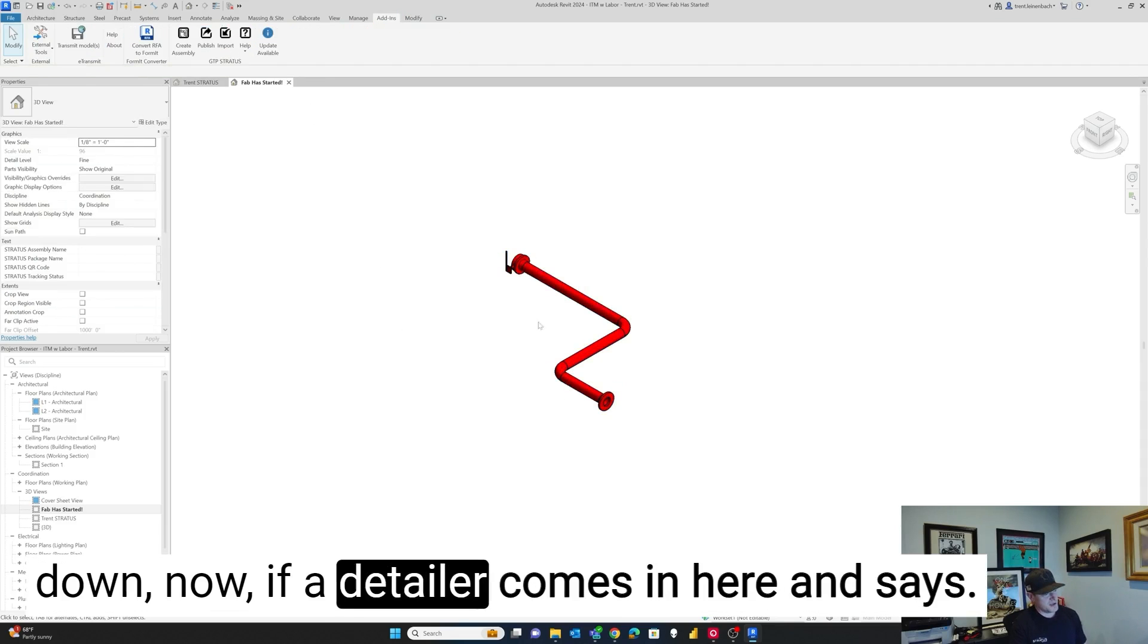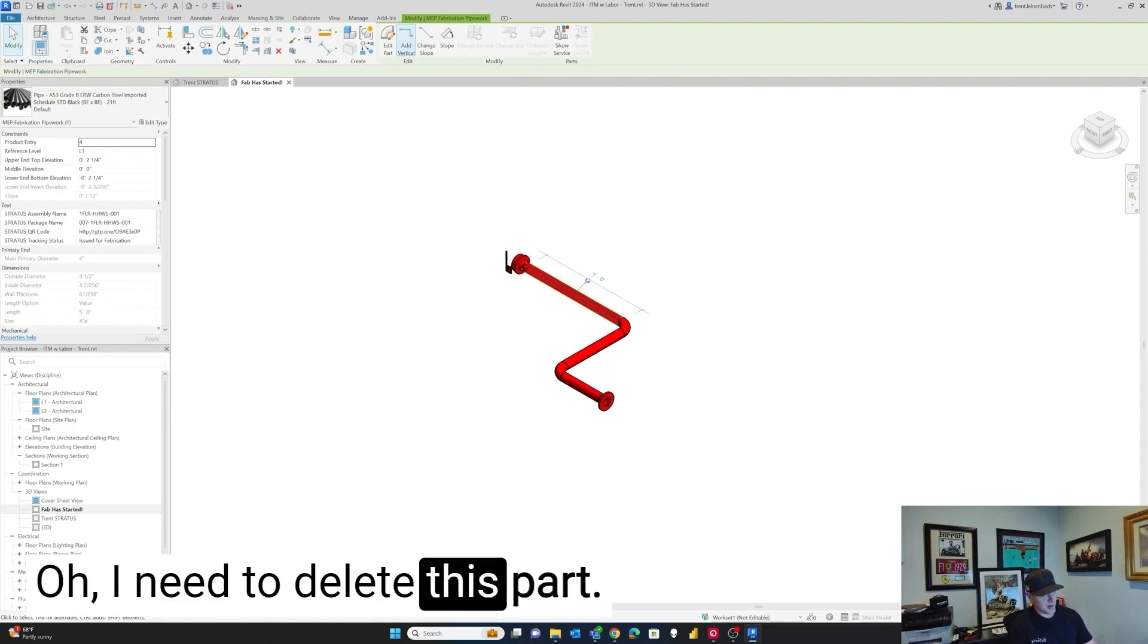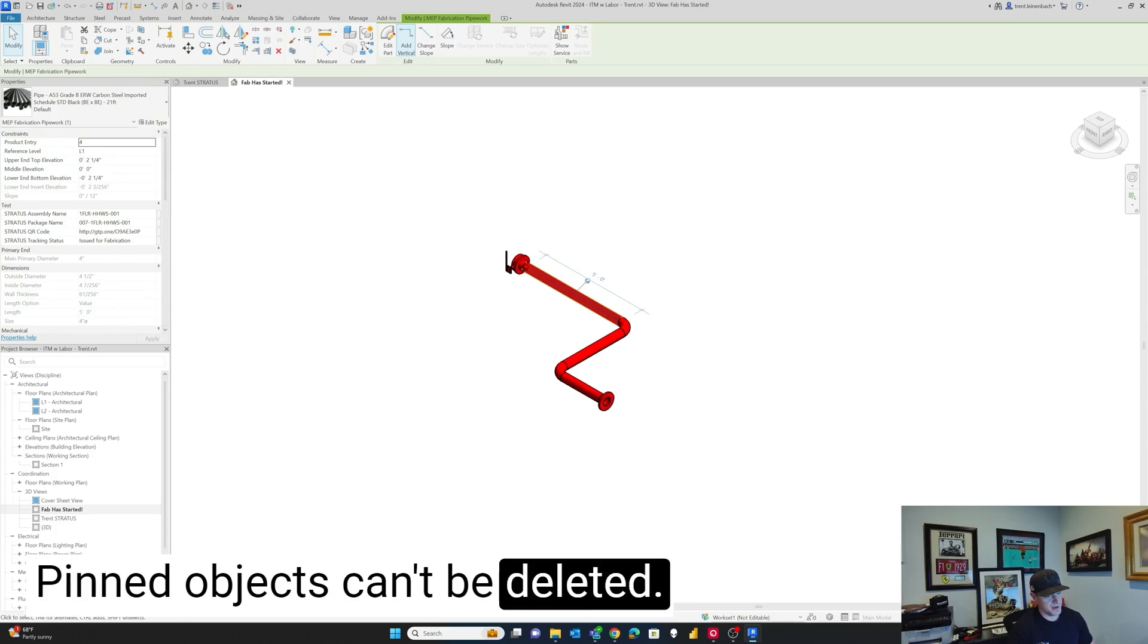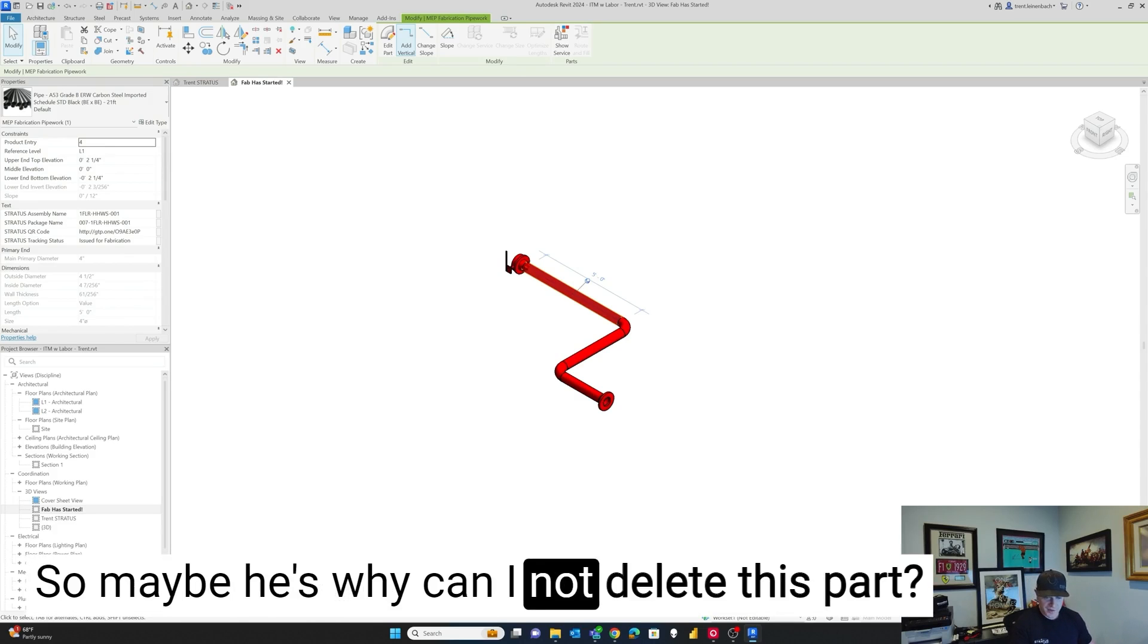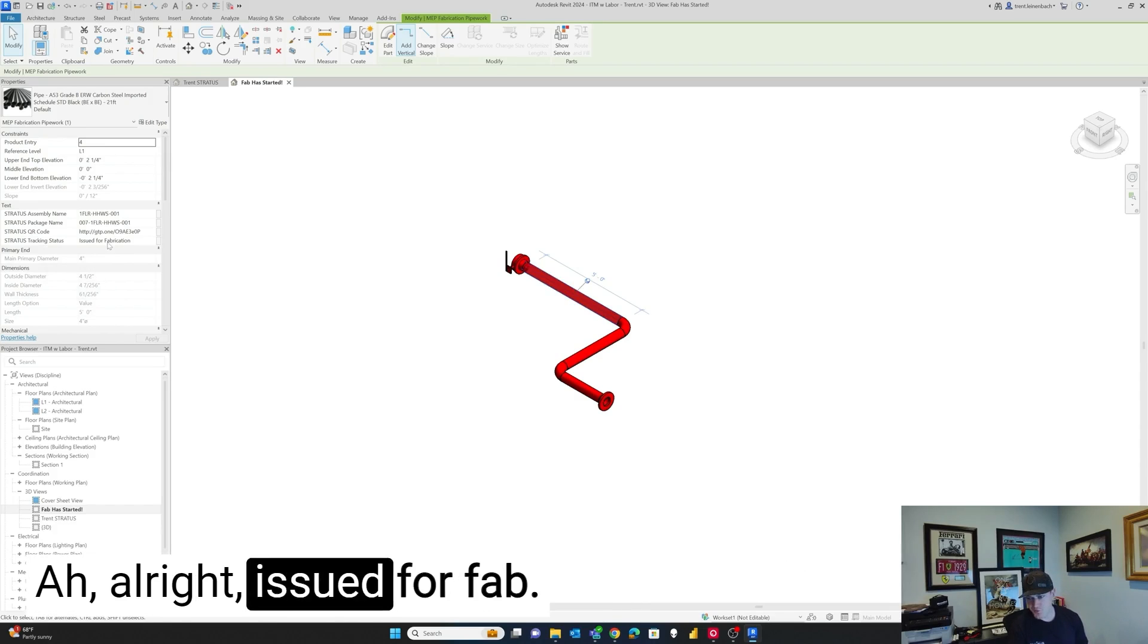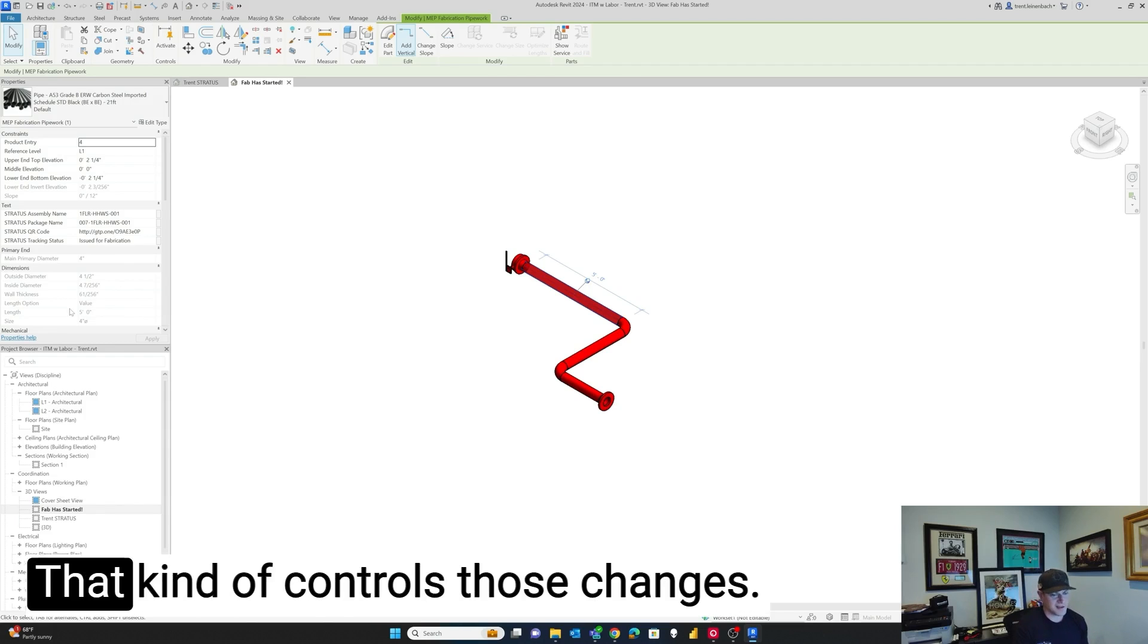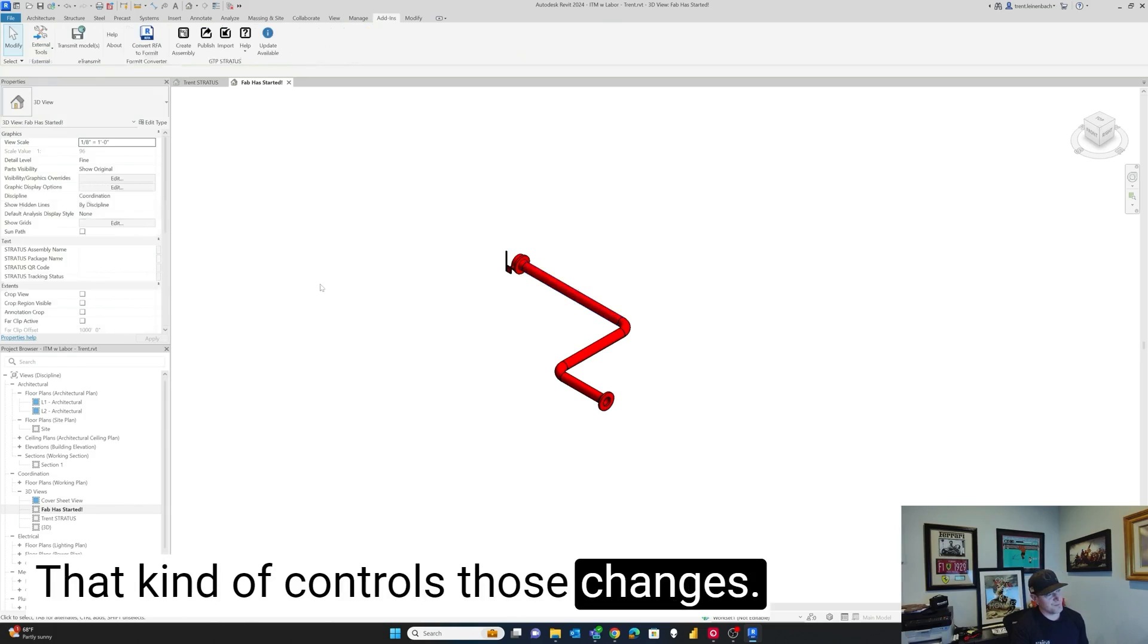Now if a detailer comes in here and says, oh, I need to delete this part. Well, pinned objects can't be deleted. So maybe he's asking why can I not delete this part? We go over here to the status. All right, issued for fab. That gets the conversation rolling that kind of controls those changes.